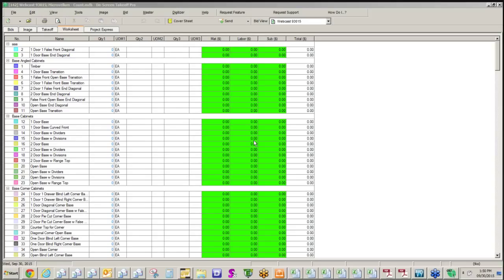This question is a little bit of a tough one to answer. It's about productivity, for someone who is going from manual takeoff, meaning we've printed out sheets and we're using scales and markers and writing or typing down the amount of takeoff. What's the productivity difference? It's certainly relative in each case, but the average that our customers have told us is that they've tripled their takeoff capacity. Obviously after you've used it a little while, you get a little bit faster with it, but about triple what you could do manually.